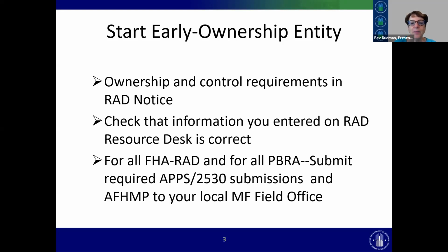So again, maybe it wouldn't ever occur to you that this could be a problem in closing, but I want to say don't leave it. If there are issues around ownership, if there are discussions, make sure that you drive them to conclusion before you get to the end. We need to know who the parties are, or my line at the time was, if you don't know who the parties are, then we can't close. That didn't go to that extreme very often, but I've certainly seen problems arise during closing related to this.